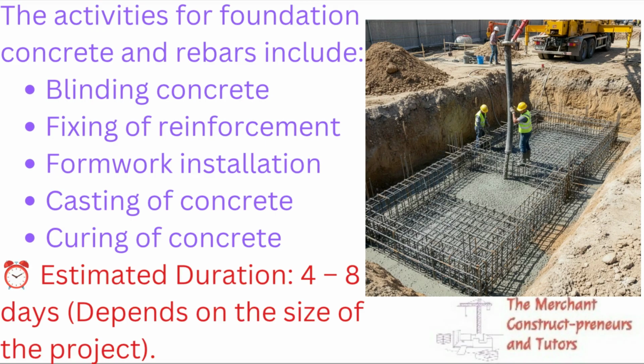So you fix your reinforcement. After blinding, you fix your reinforcement for the pad. You put your formwork too. If you have a beam, you put your formwork too. Then you cast the concrete. You cure the concrete. These are the steps for this particular stage. Estimated duration within 4 to 8 days, yet still depends on the size of the project. So these are the activities that are within this.